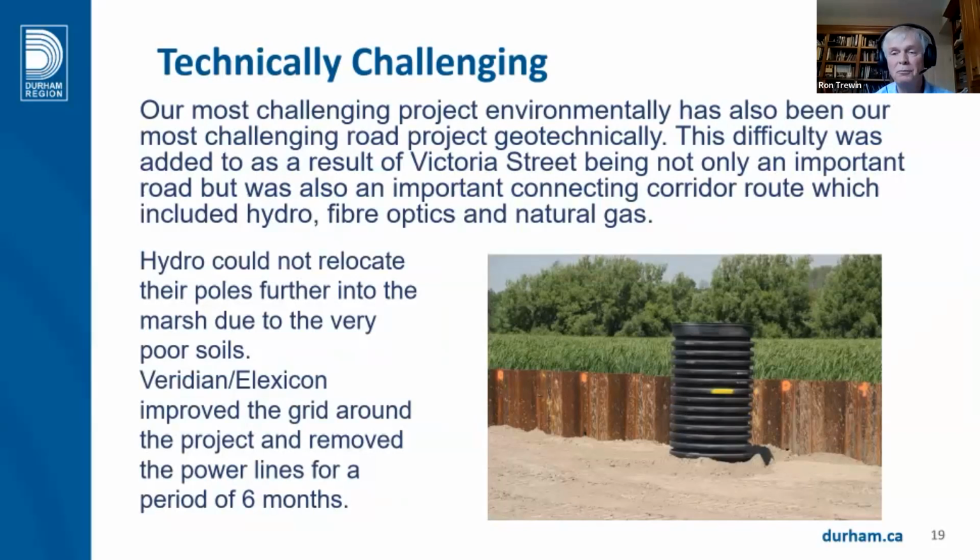Just before approval of the final hydro relocation design, Lexicon determined that it could not relocate into the marsh due to the weak soils. We did not want them accidentally destroying it. I have to give credit, Viridian, or Lexicon, helped us with this. Basically what they did is they strengthened the wires. They improved the wire lines along Highway 2, rerouted down Lake Bridge, and were able to reroute the whole area for about 6 months while they removed these wires.